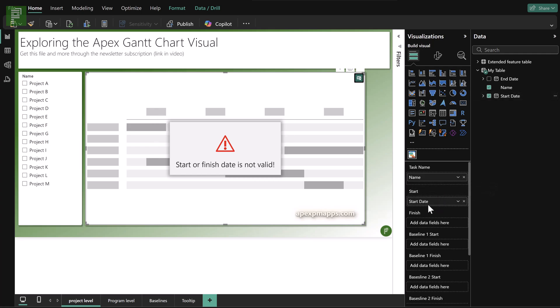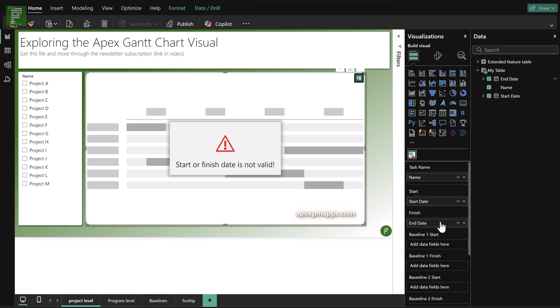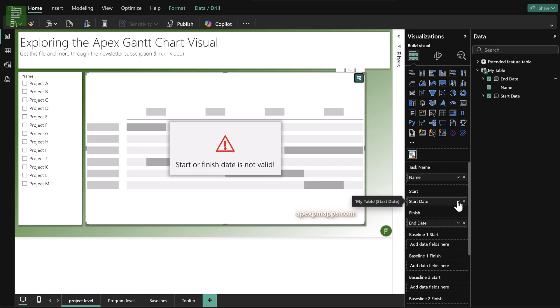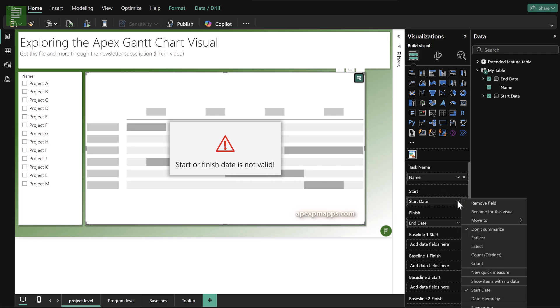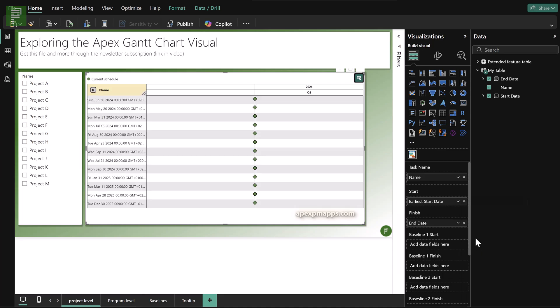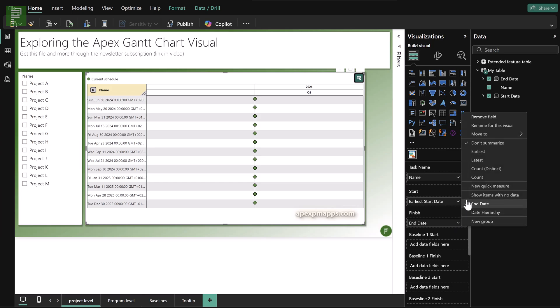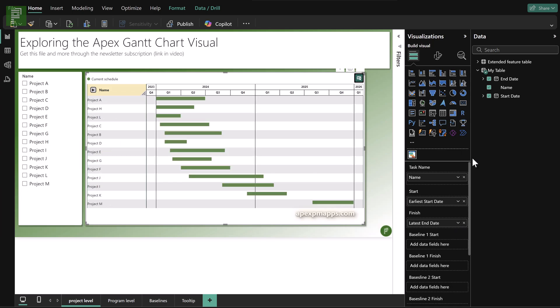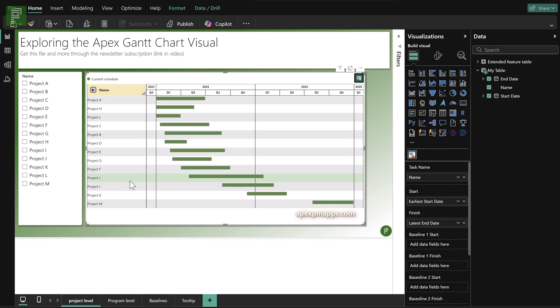the message changes to start and finish date is not valid. Well, that's scary at first, but don't worry. The only thing that you need to do here is make sure that the start date is at the earliest and the finish date is at the latest value. And there you have it. Now you have a first version of your Gantt chart visual with the projects in there.